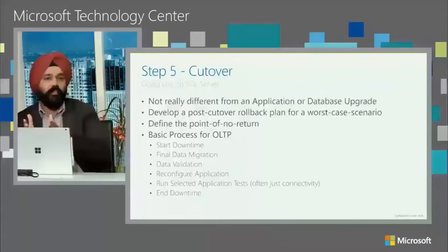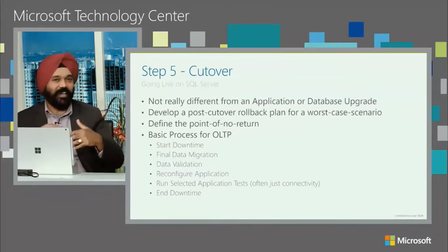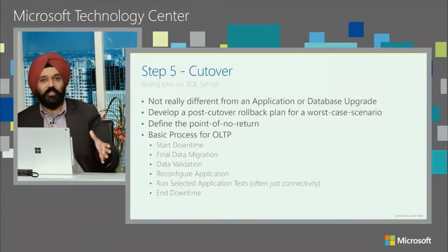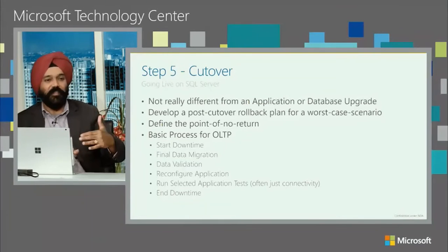Data is still replicated in real time, and then they start bringing some of the updates, batch jobs, and things like that over to SQL Server. So the point here is, the cutover doesn't have to be, oh my God, I've got to turn off my Oracle, turn on my SQL Server, and pray everything is going to go well. Right, it's not all or nothing. All or nothing, exactly. So you have different levels of cutovers that you can deploy.